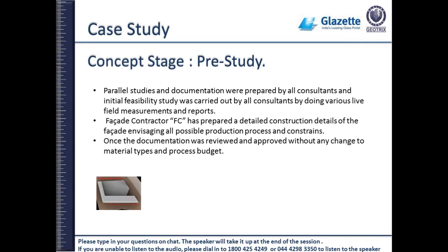See, if you look at the whole building, if I remember the number exactly, the screen you see on the outside was like a designer saree. As per the design done by the modeler and the designer, the facade contractor had to make roughly 6,748 unique panels.